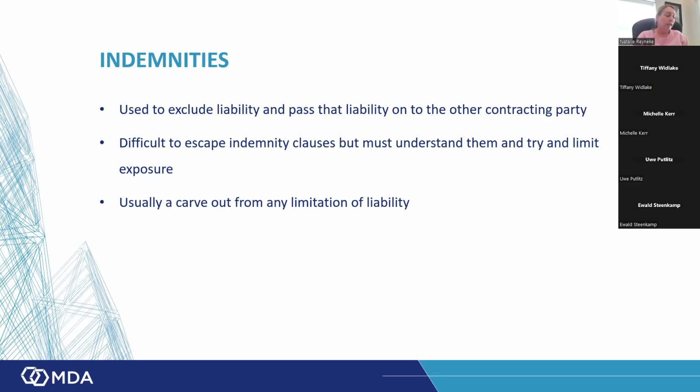In the bespoke contracts and some of the amended contracts too, the indemnities clause is clause 7, but in clause 4 and then in clause 6 and then in clause 32, they've got the contractor indemnifies the employer against any claims for a breach of this clause. So be very, very careful of that. From an employer perspective, what you're doing is you're telling the contractor that he needs to make provision in his price to take that risk on.